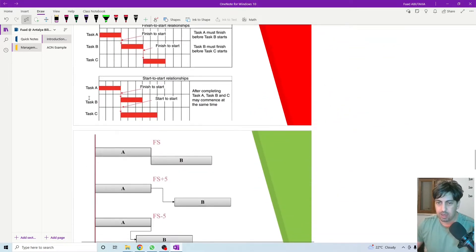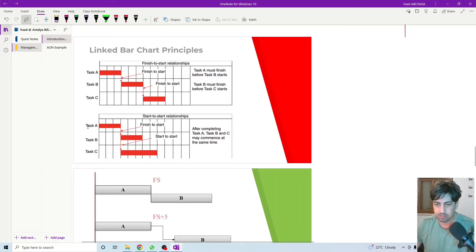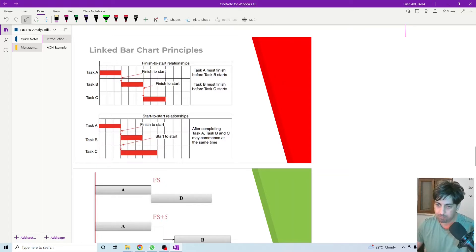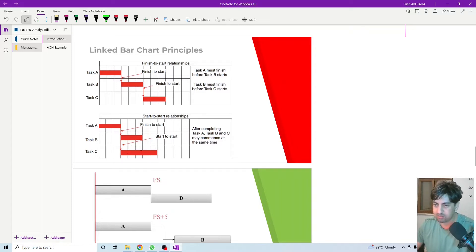In another Gantt chart example, I have task A, task B, and task C. The relationship between task A and task B is clearly finish-to-start. The relationship between task B and task C is that they are starting the same day — so task B and task C have a start-to-start relationship, no matter how long each takes to complete. They are restricted to start at the same time.